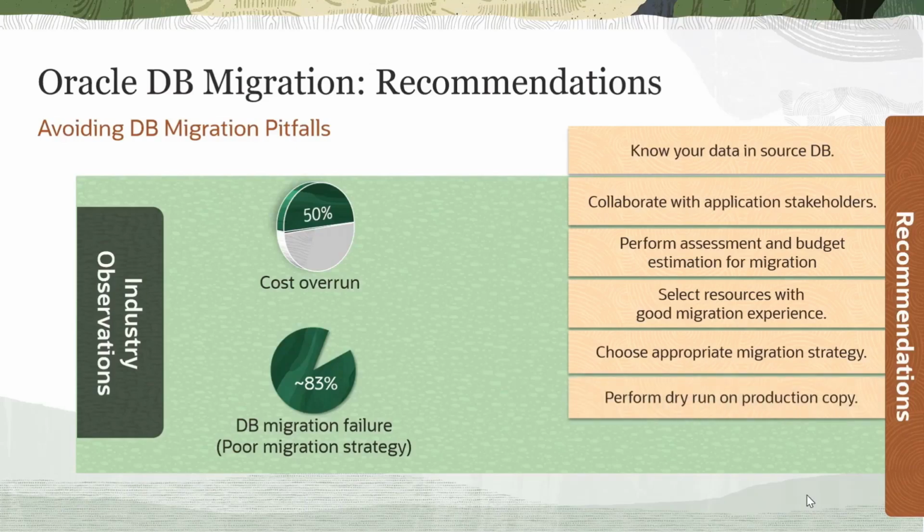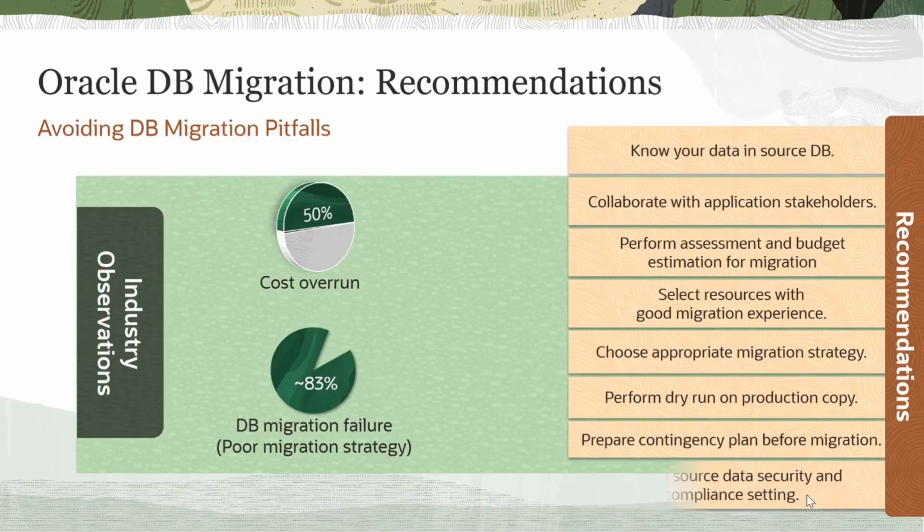Perform a migration dry run on a non-production environment with an equivalent size of production data. This will point to any issues that may arise during migration so that you can resolve such issues and apply the same resolution during the actual production database migration. Prepare and test a fallback plan for every migration in order to revert back to the original state if the database migration fails by any chance.